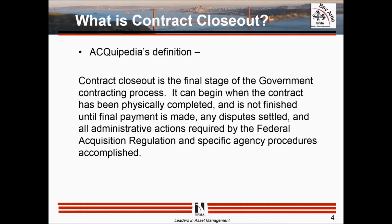So as I go to the next chart, which is the contractor's responsibility, this is a specific definition out of FAR 52.245-1. And the key there, highlighted in blue, is that the contractor's responsibility extends all the way through being formally relieved of responsibility by authorized means, including surplus property or disposition, or via completed investigation, evaluation, and final determination. So what does that really mean? Let's get to the next slide.